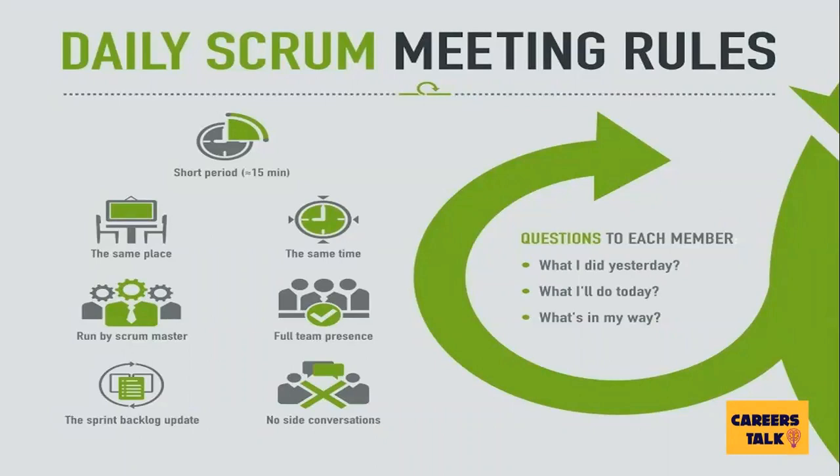In Scrum framework, on each day of the sprint, the team holds a daily sprint meeting called the Daily Scrum. Meetings are typically held in the same location and at the same time each day. Ideally, a daily Scrum meeting is held in the morning as it helps set the context for the coming day's work. These Scrum meetings are strictly time boxed to 15 minutes. This keeps the discussions brisk but relevant. The purpose of the daily Scrum is to help progress towards a sprint goal and to form a 24-hour plan to increase the likelihood of the sprint goal being met.